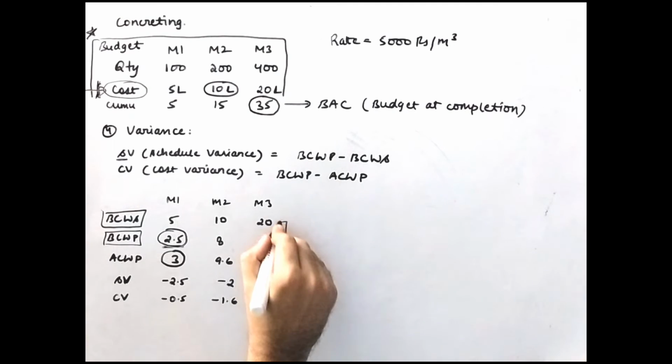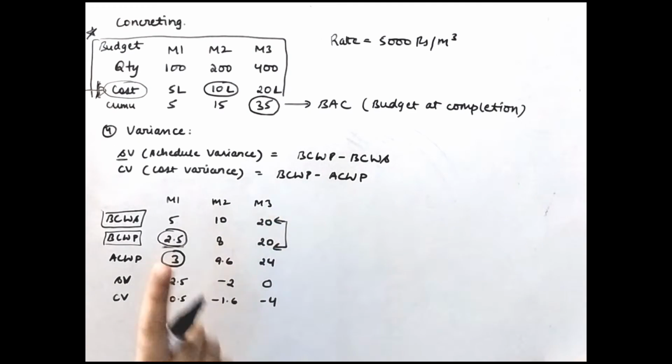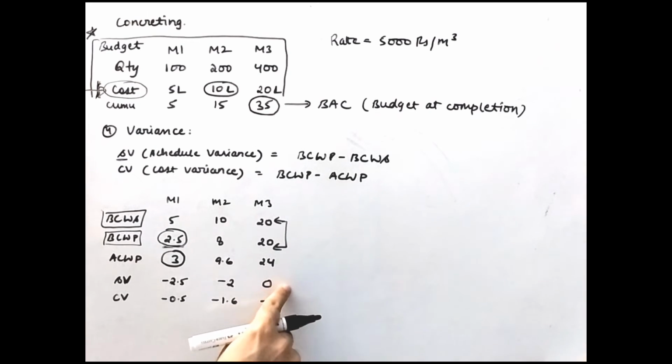We were on schedule because we performed the same quantities, but the cost increased, so therefore you are able to see minus 4 in the third month. The schedule was absolutely fine because the quantities were the same, but cost is the difference in all 3 months because we consider the same unit rate of 6,000 in all 3 months. I hope this is clear to you.